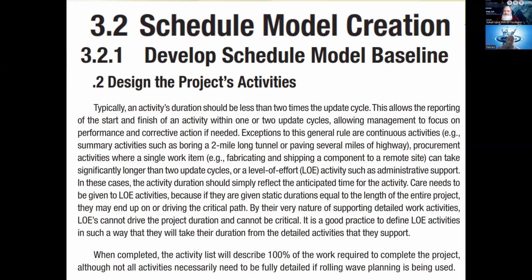So even if the job is not complete, one update cycle has come, first report, we will say 50% complete without even measuring the physical progress, right? Why should we do that? Generally, we will go by the rule that an activity would not be declared complete until it is fully complete, 100%. It's called the 0-100 rule.